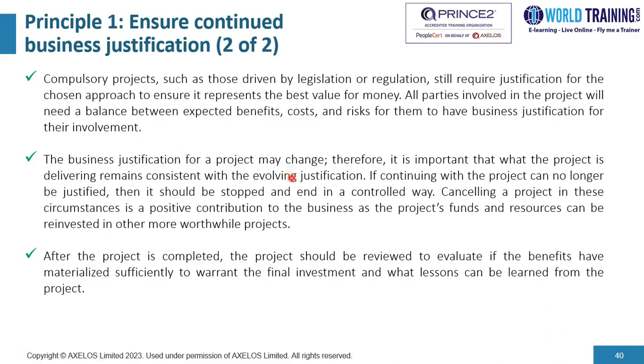An example of this would be a city council that decided to build a conference center, but immediately after COVID hit the world, they had to pivot and change the direction because the benefits articulated earlier, prior to COVID, were not valid after or during the time of COVID. So things do change, so you need to make sure that you accommodate for that change.